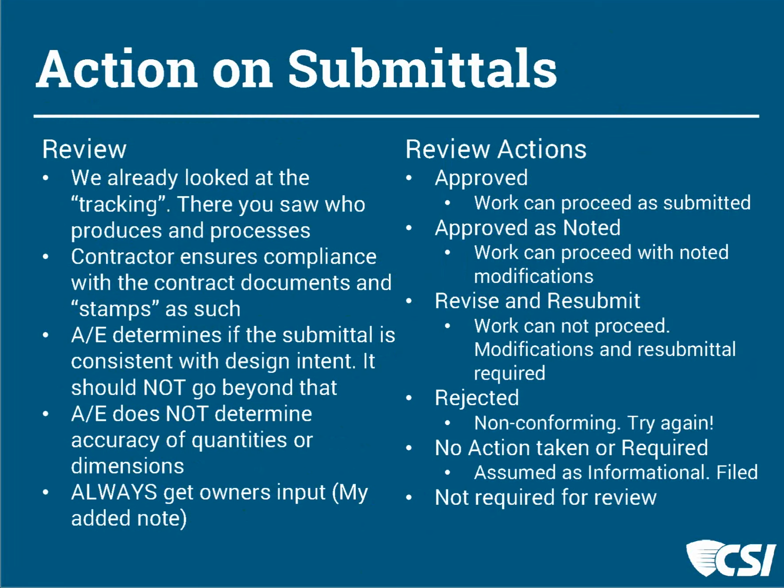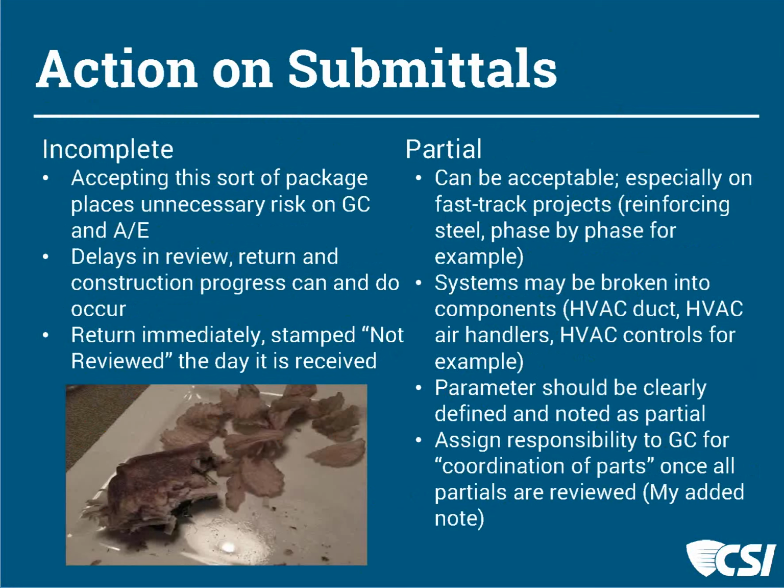Let's go to the next slide and talk about what might be an incomplete submittal that we're unable to take any action on whatsoever. So what if you receive a submittal that is incomplete? Well, then you do take on unnecessary risk in doing anything with that submittal, in processing it. Perhaps the general contractor didn't look at it. Perhaps there are only certain pieces of it that are in the package, but there are more pieces that are necessary. This can create delays in the project.